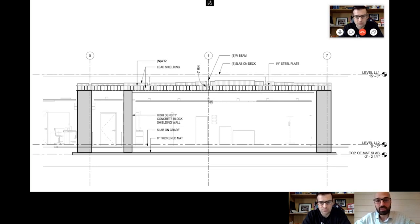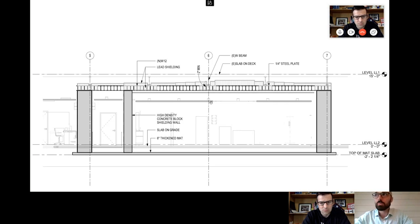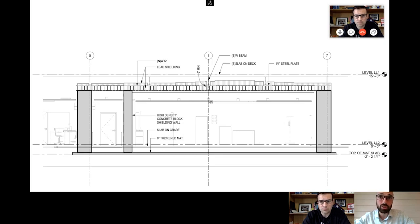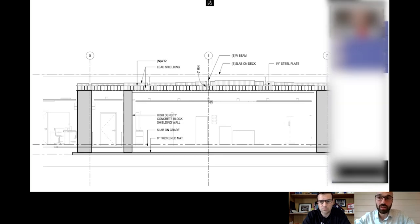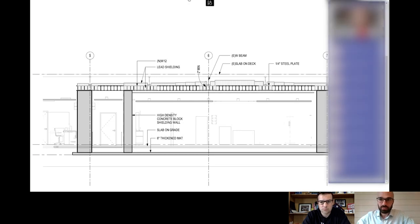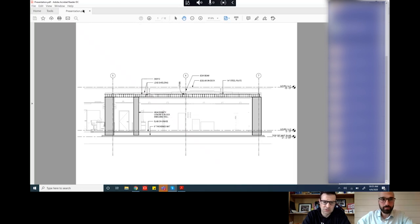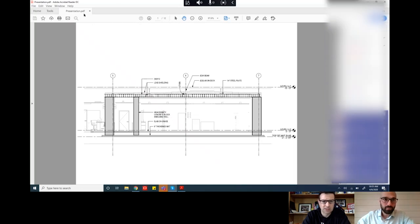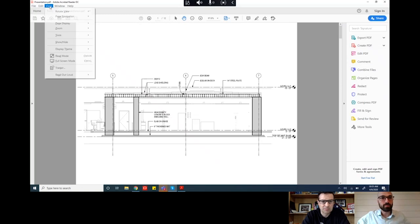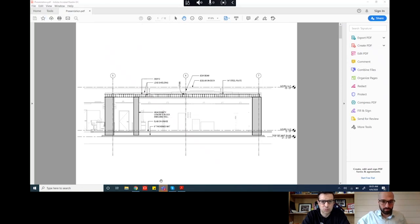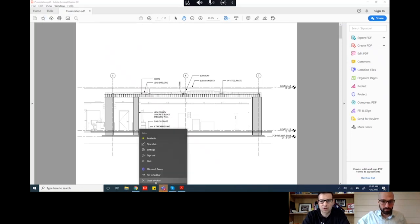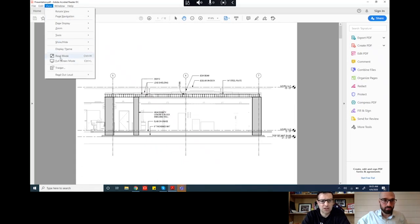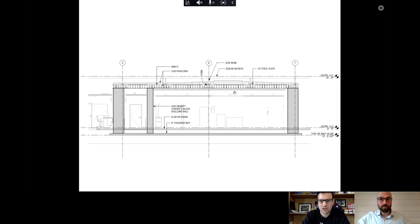So we had a typical value engineering meeting where we put a matrix together of everything we could do to make this a little less expensive, and we brought in the guys from Nelco who are experts in the shielding realm. Nelco is a local company here in Massachusetts, but they work all over the world. If you're doing MRIs or you need lead shielding, they're kind of one of the go-to companies. They're really a specialty subcontractor.